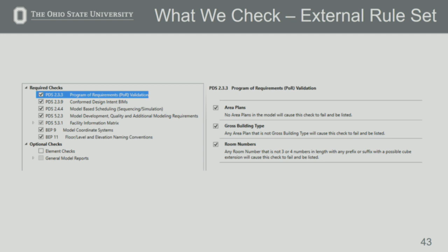in that we're not going to go in there and do all these checks ourselves. We actually have it in our project delivery standard that they will just give us a copy of that report. So if they have any deficiencies, they're going to send us a report that has those deficiencies. Sometimes they have a question, like, I don't understand why I got this deficiency, or this deficiency doesn't make sense in this particular situation. But they're expected to go ahead and run this external rule check that's just for projects that are being delivered to us.